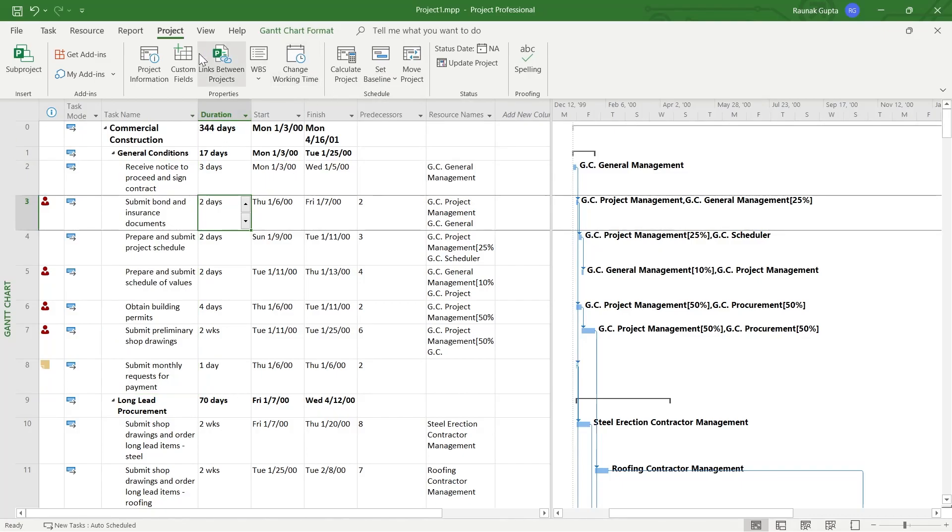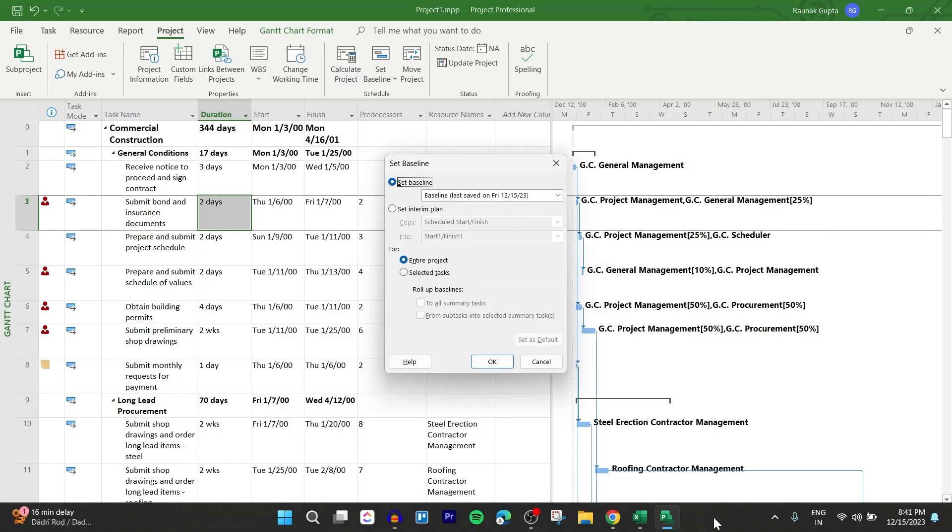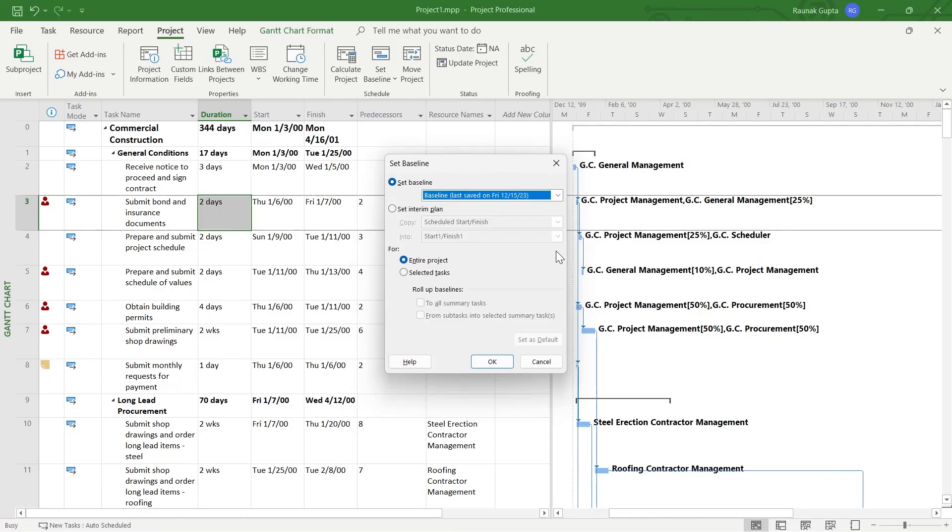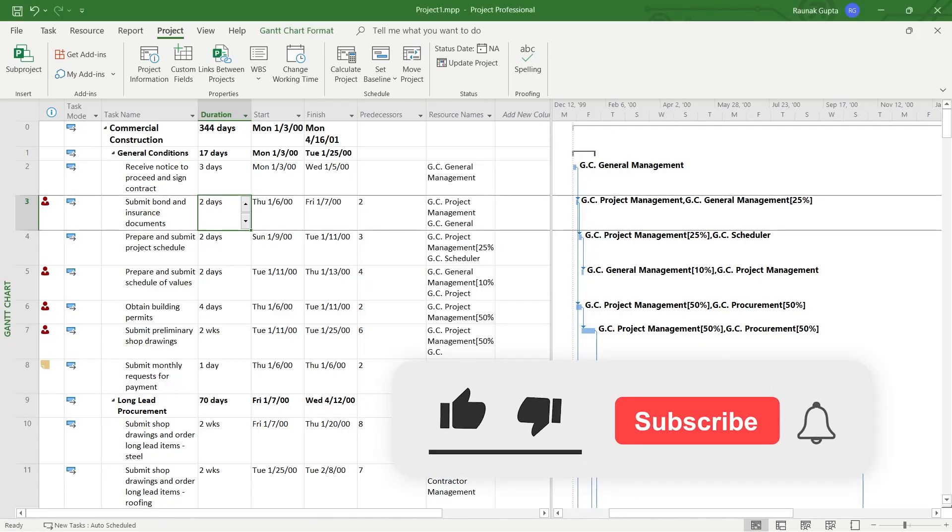So you can see right here, if we go again to project and click on set baseline, you will see the baseline last saved on Friday 12, 1523. So this is today's date. So you can see I have just selected a baseline and it has been saved into my file directory. So that's the way through which you can set baselines into MS Project.